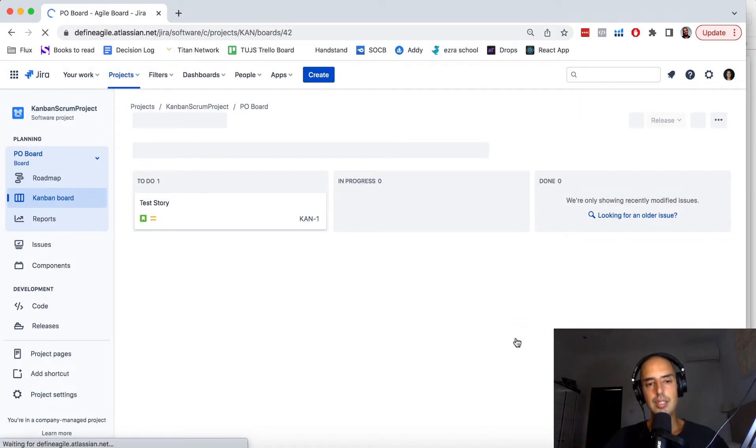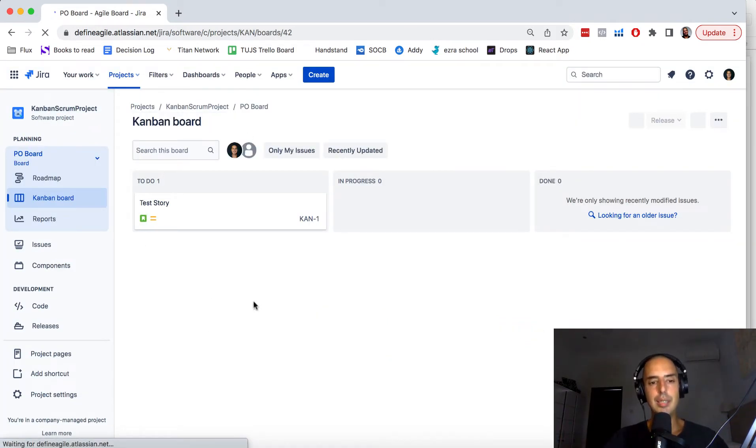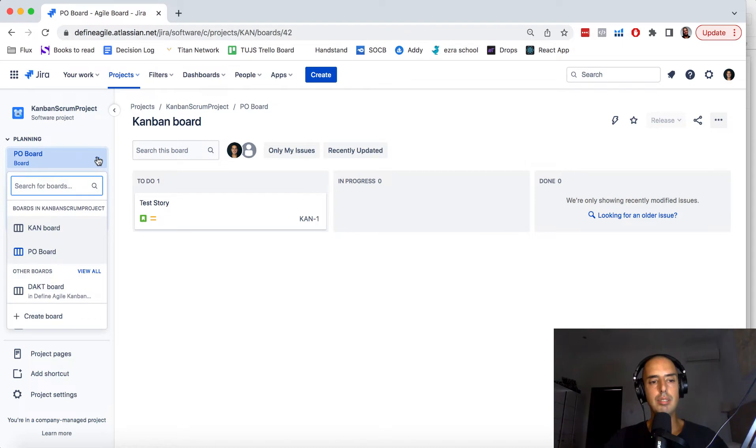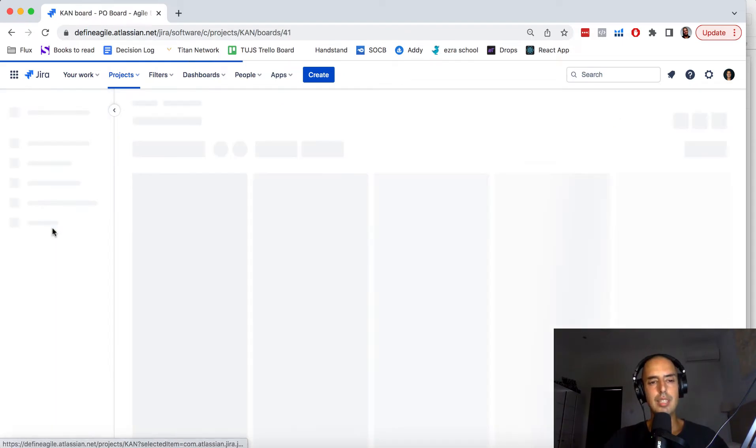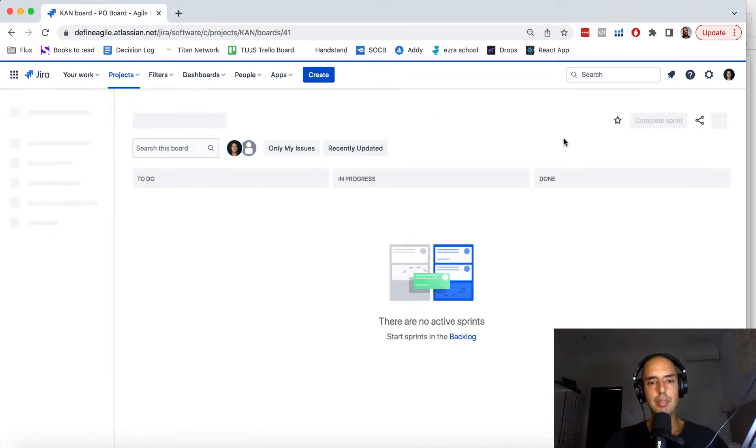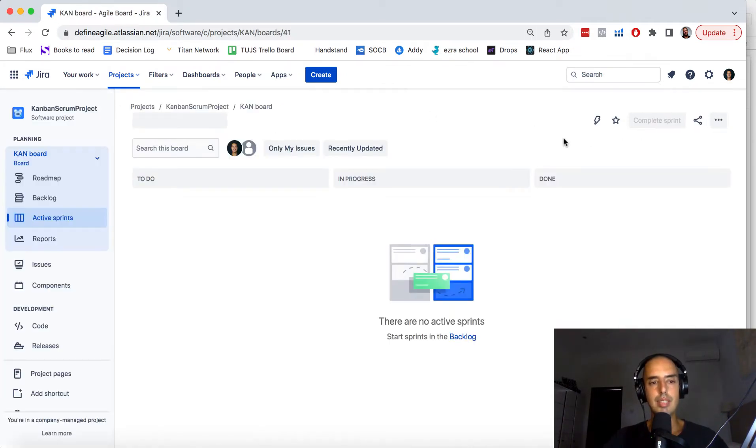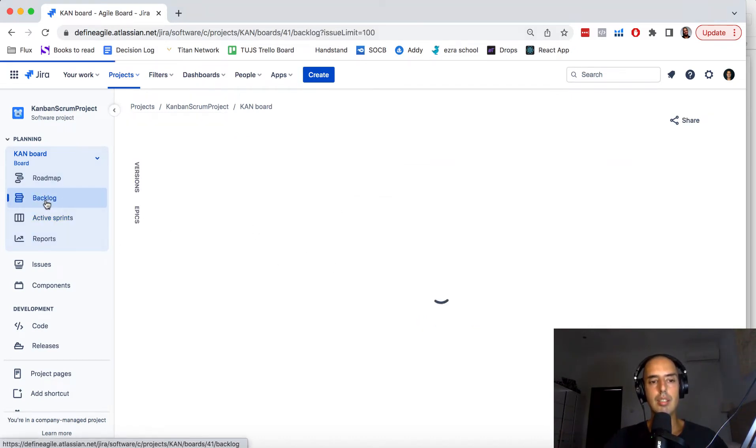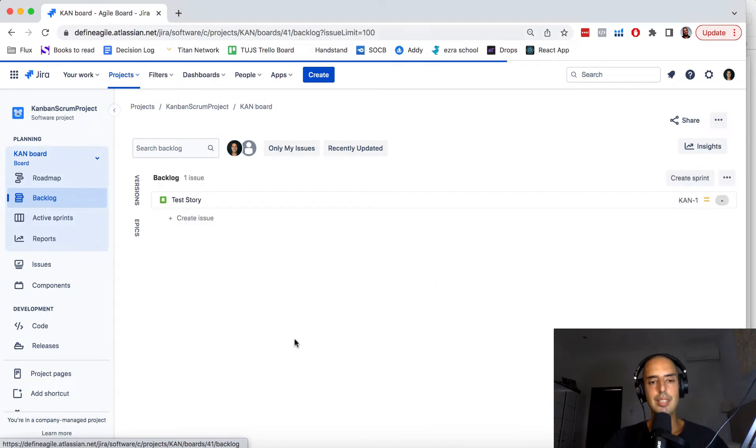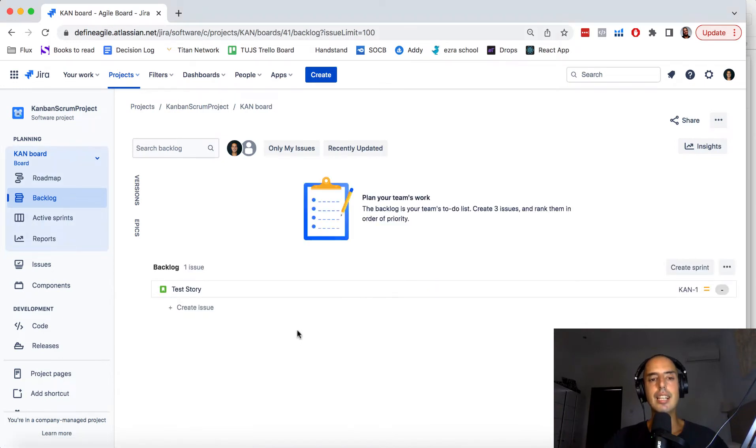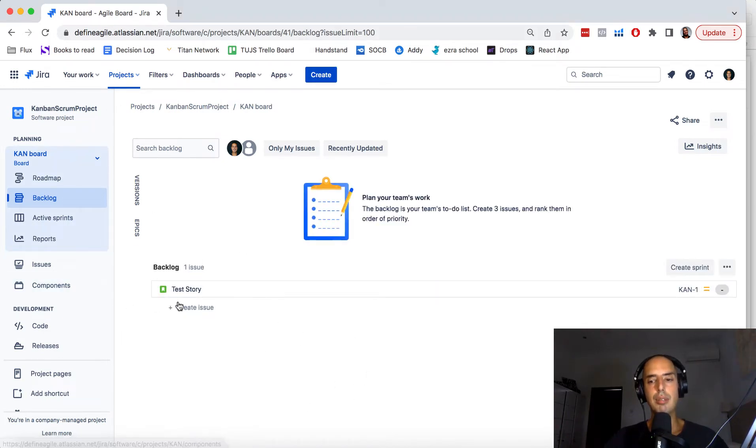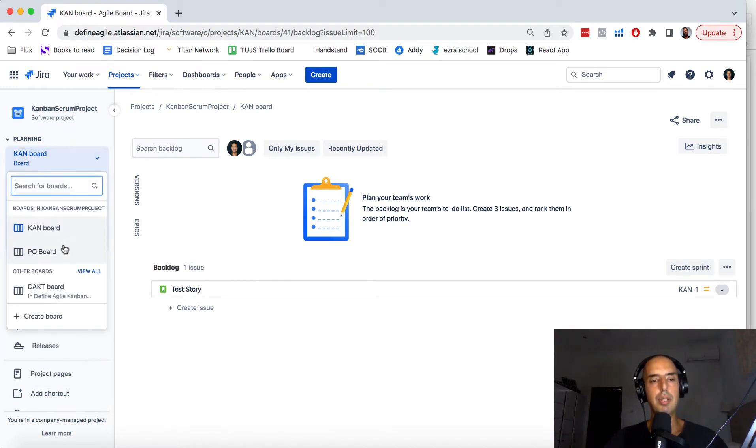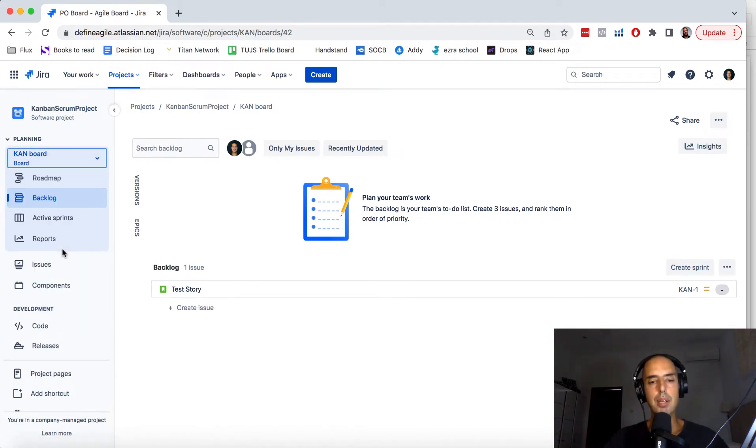Now interesting thing. See they're sharing the same story. So this story right now is in to do here. But if I switch to the Kanban board which is actually a Scrum board we can change it or development board, it's not here. It's in the backlog. It's quite interesting isn't it. So you can have a story in the backlog but the story can also be available in your Kanban board.